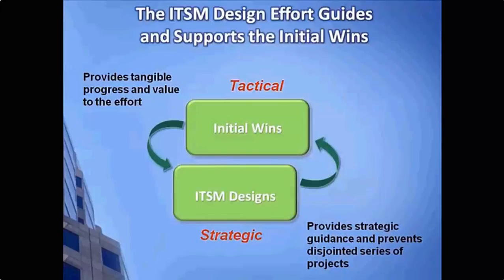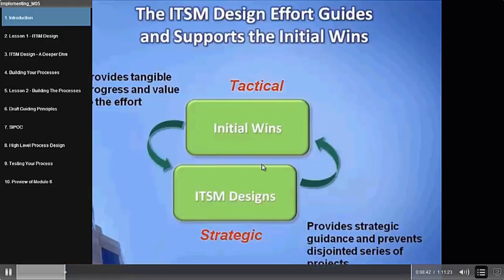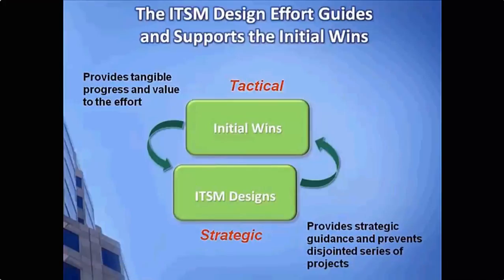If I only focused on the initial win activities, those tactical items in terms of implementing specific things that people can see and touch, the end result of that would be that I may have a mess, if you will, of individual projects without any guidance or integration. Lots of little things that are going on, but it's very unclear how they tie together or how they work.